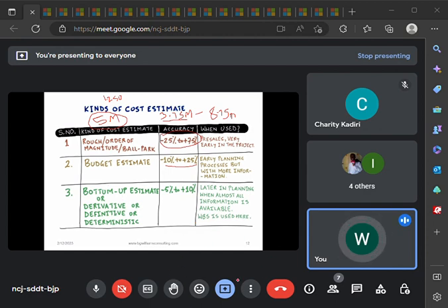Why are they mentioning the same grammar? At this point, you are very sure of what it will cost you to complete the project. Which means at this point you are already planning, you are using the WBS to do your estimation. You are not just making calls and looking at how much they are selling all the materials now, but you're actually breaking it down according to the WBS to help finalize on the estimation of each of those activities. So whatever your summation will be at that time, when you are now more detailed in your plan, take note.